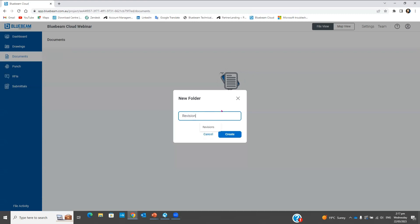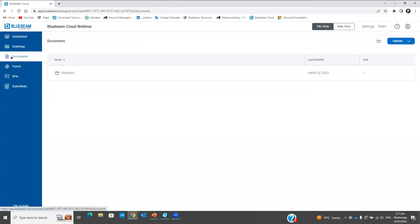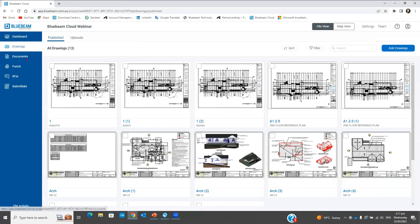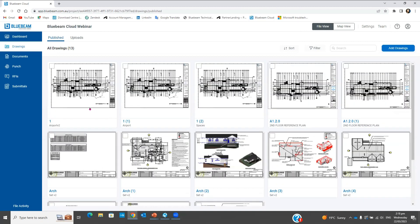At the Documents tab it's a document management place — you can have everything exactly the same structure as in Bluebeam Studio. For example I can create a Revisions folder here and upload files to it. The key difference is: you can mark up drawings from the Documents tab but you cannot create punch lists and RFIs there — it's just for markups. So if you're thinking about the field team, upload your drawings to the Drawing section, not the Document section.